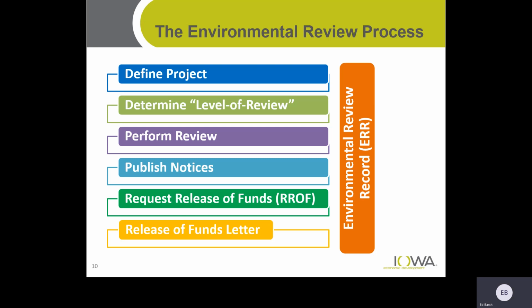Review process. Well, you start with defining your project. Very important. Sometimes I think people overlook a full definition of the project and a full understanding. You determine your level of review, perform the review, publish your notice, depending on your level of finding, which we will get into here in a minute.